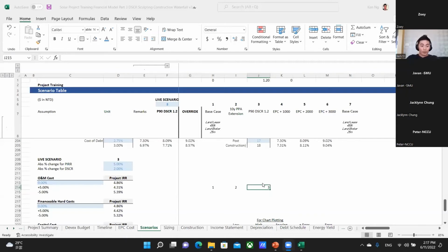As a result, what we want to know is, prior to us getting the SI approval, which is in August, how much money have I spent up to that point? Up to August, I spent 9.6 million bucks. Then upon getting the SI approval, I'll need to make a payment to the permitting consultant as a milestone fee.